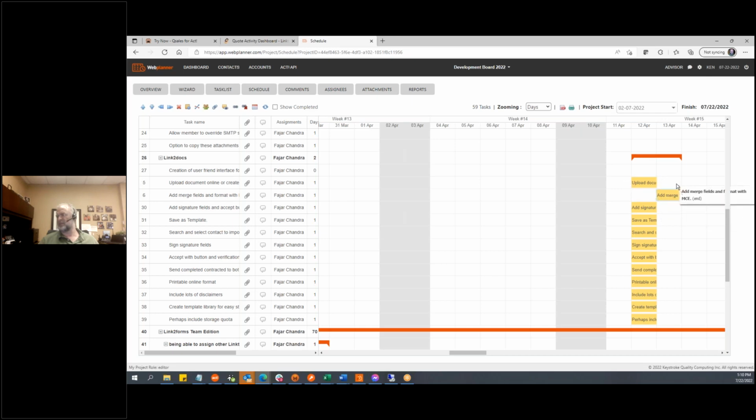So what I've done is I have created this as a predecessor. Now the beauty of this is if I've got to complete this and this thing gets delayed, watch what happens. It moves the whole thing. So that's one of the points of having predecessors.